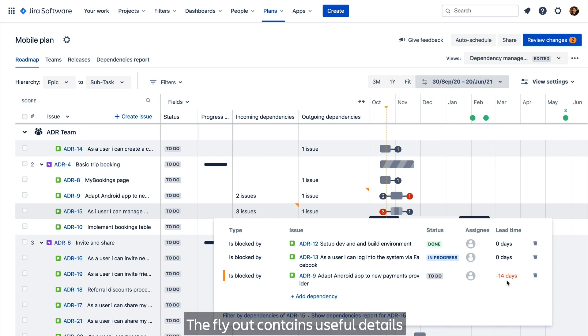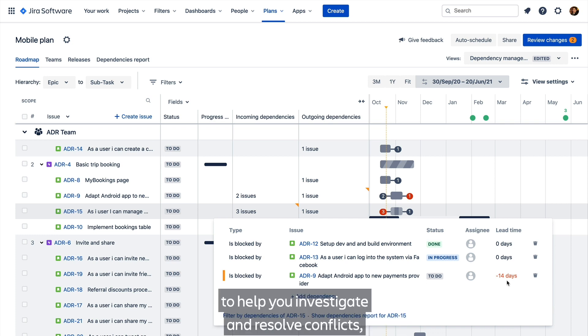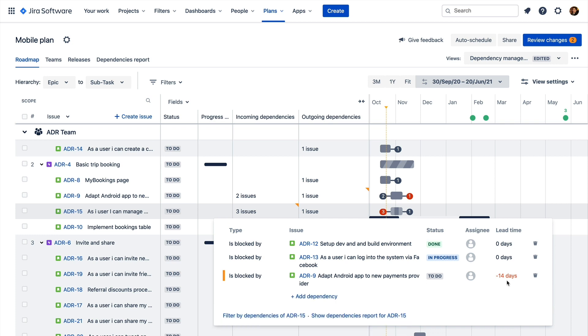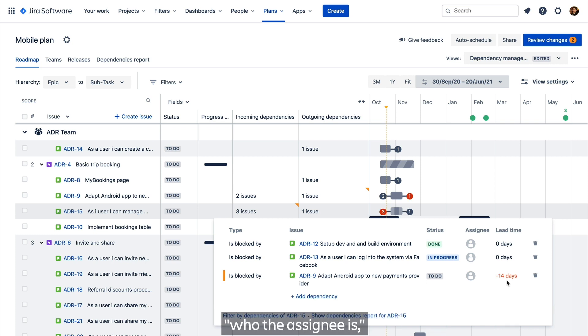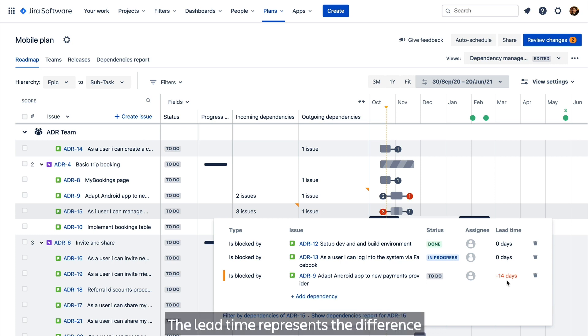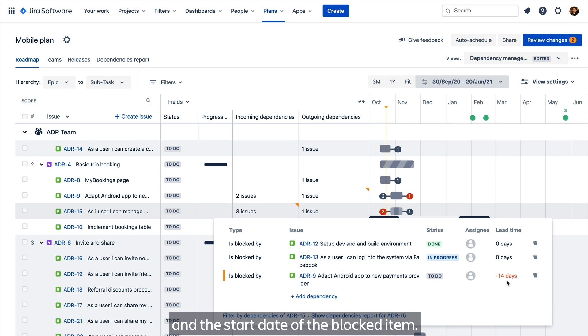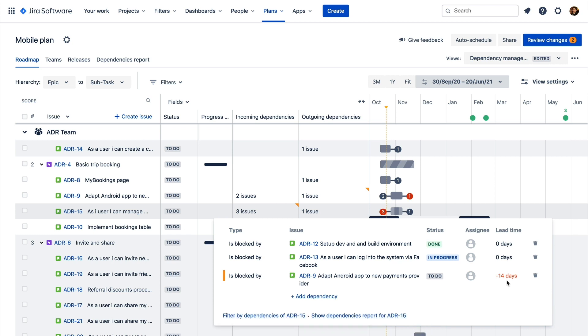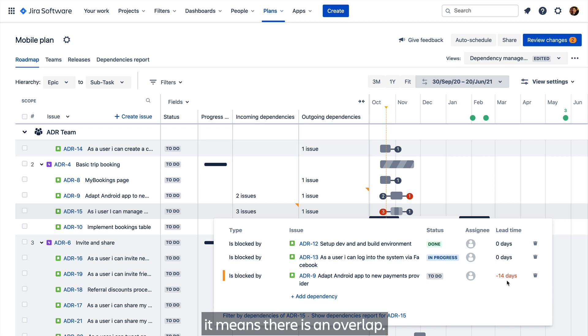The flyout contains useful details to help you investigate and resolve conflicts. See what the dependencies are, who the assignee is, the status of the issue, and the lead time. The lead time represents the difference between the end date of the blocking item and the start date of the blocked item. When it's negative in red, it means there is an overlap.